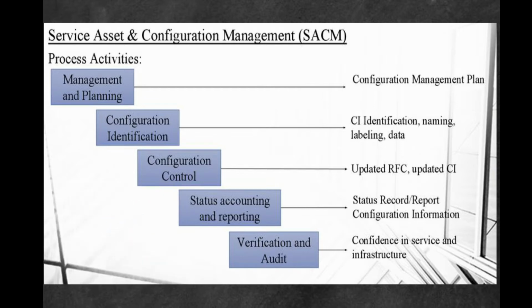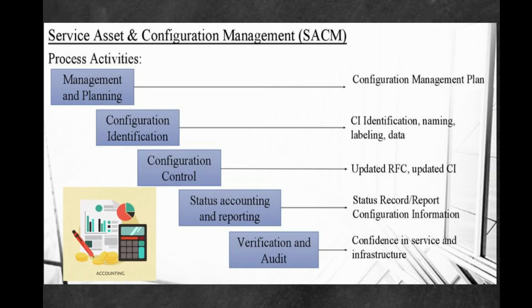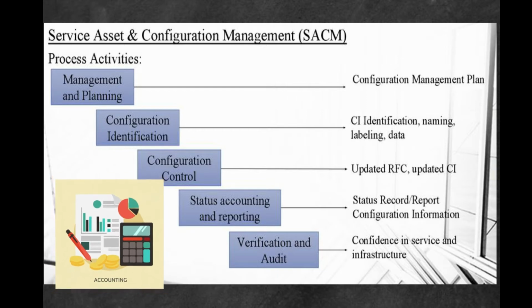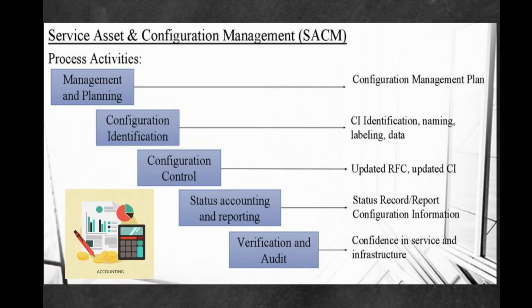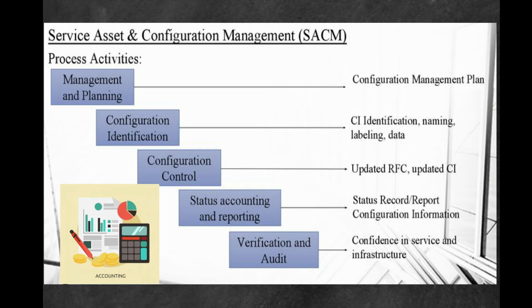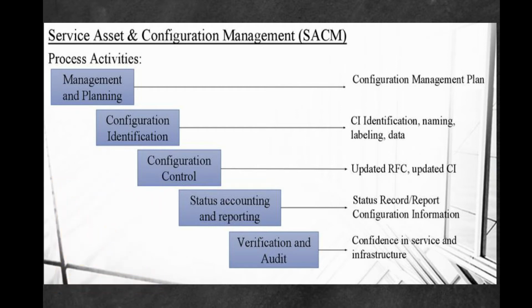The fourth activity is configuration status accounting. All it means is that you can see the status of any item whenever you want. That's why your traceability matrix is important. You should be able to see that an item is open, closed, or in progress, checked out and to whom, or any other status that you've decided to give it. Every time the item is changed or being worked on, the matrix should be updated so that it's clear what is happening to the item. Then the latest version is logged too so that you can always refer to the current version.